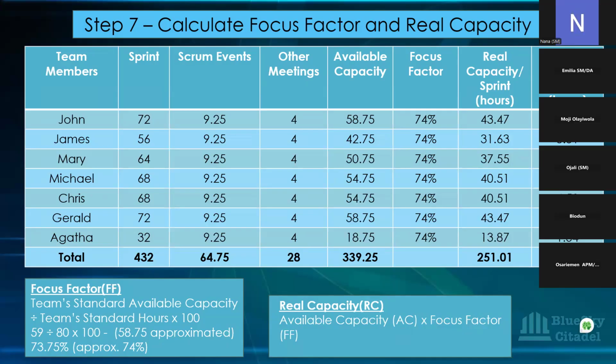Remember that when we looked at that cup filled with things, we saw the focus factor and the aspect of taking breaks. So at work, you will take a break, isn't it? They will take a break at work or to have their lunch. At times they stand up to stretch. At times they stand up to go and make coffee, tea, and everything. That needs to be factored in. And we use a percentage to factor that in so that we have the real capacity.